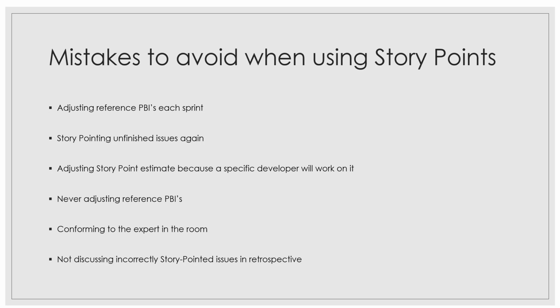Or another way, if your team is local and it's not distributed, you are sitting in the room and doing it, you let the expert elaborate on what specific work needs to be done as part of this user requirement. Create steps out of it, define subtasks out of it, and then have the rest of the team estimate without the expert. But I would still suggest that even if you are doing it in a room, please make use of some online available tools wherein no other person in the team is aware of what others are keying in as their estimates, because the second situation is something wherein we are leaving out an important team member. So that I would not prefer, but it's up to you to decide.